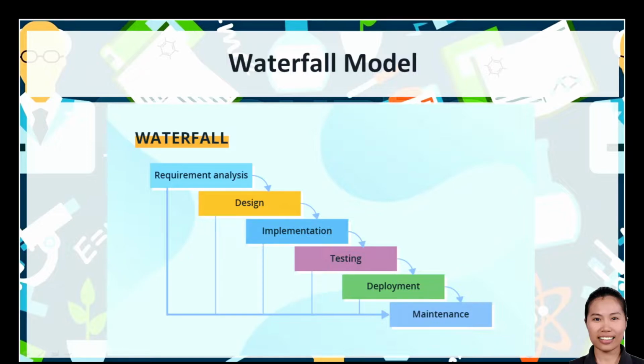For example, software requirements cannot be re-evaluated further in development. There is also no ability to see and try software until the last development stage is finished, which results in high project risks and unpredictable project results. Testing is often rushed and errors are costly to fix. So, ito yung usual na ginagawa natin. Okay? Gusto natin tapusin muna lahat, tapos i-fix na lang natin later kung ano yung problem.